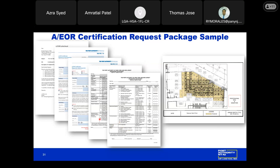Also below that, you will have the name, entity, and license of the engineer of record. So I want to just focus in on the dates, as I mentioned before. This special inspections checklist starts from the pre-con, where the engineer of record identified all the special inspection categories that are necessary in testing for this TAA. It is modified to tailor and capture it all. And as the work is taking place and the inspections are being requested, this form gets populated.